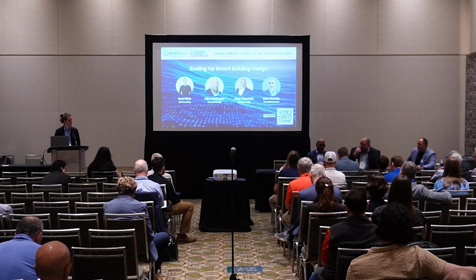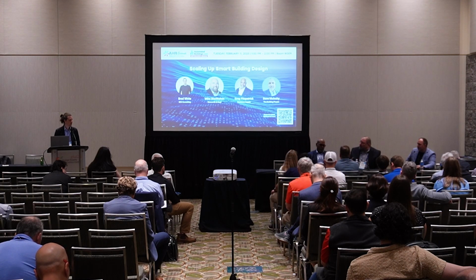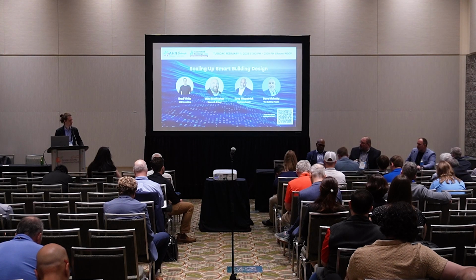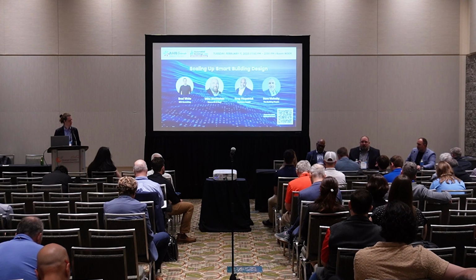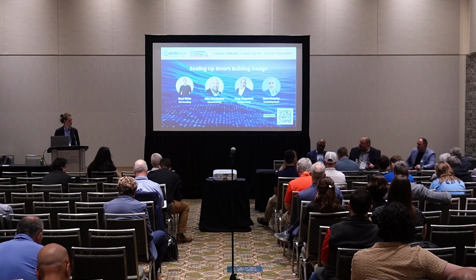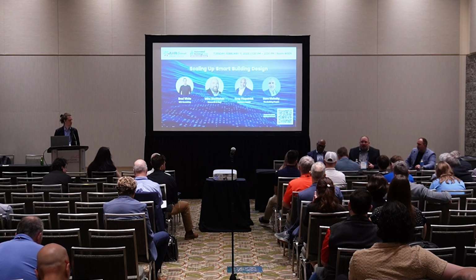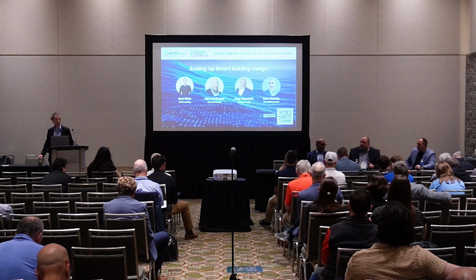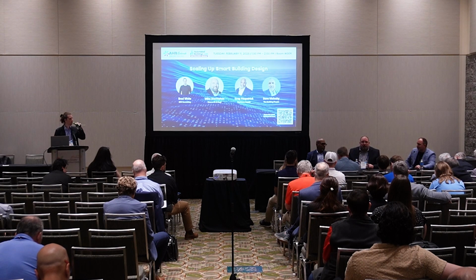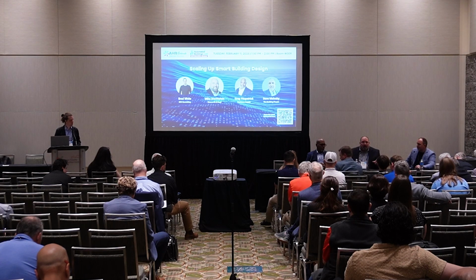Yeah, one client I did a cyber commissioning job for, it was one of those that came after the building was built. And so I said, okay, this is going to be for your awareness then, because there's no obligation on the part of any of the system integrators to do any of the fixing, because it wasn't there in the contract to put it in. And that was one of the bigger things that I found: in order to get an IP address to get on the network, they had to provide a spreadsheet and then they were given a username and a password from IT. And that was now going to be the default, but it was given by the IT group. And I thought that was a really slick move. In order to get on the network, you have to change these things.